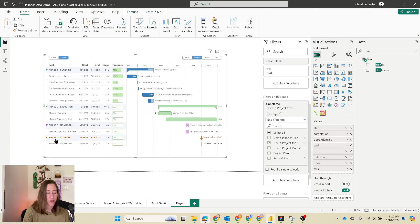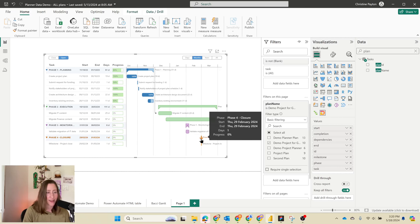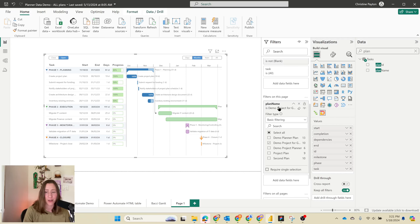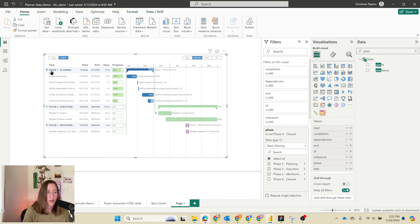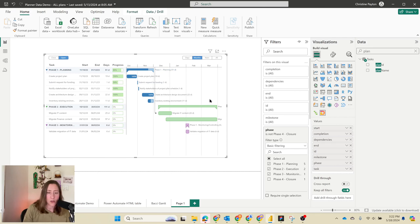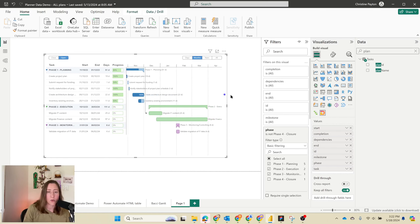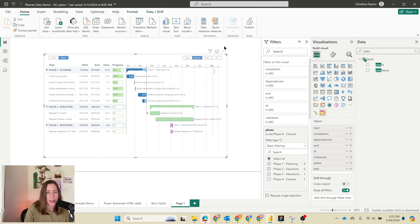So now if we go back to our report, this is what it looks like — looking pretty good. I have this phase four that only has one task in it and that's making the task here look really funky, so I'm going to take that one out. Your phases should be more than one day in duration if you want to avoid that. The phase names here are coming from my bucket name — I actually have 'phase one' inside the bucket name, that's why it says phase one; that's not coming from the template. When you're using this visual, you can click and drag to scroll it side to side.